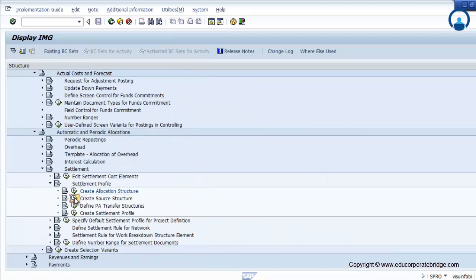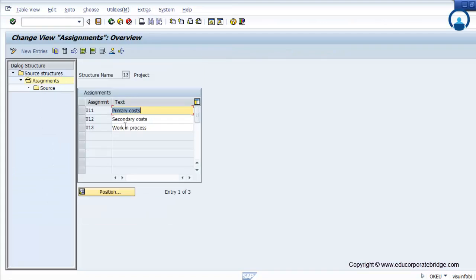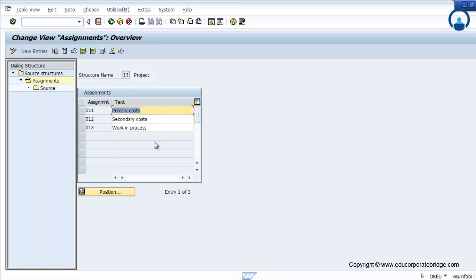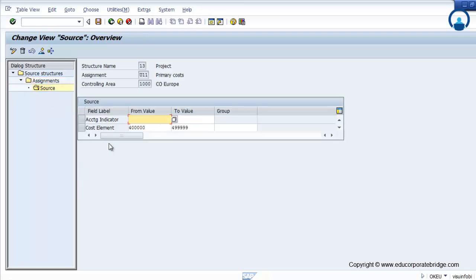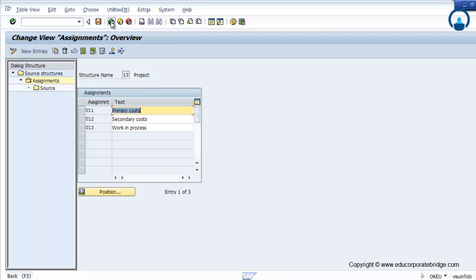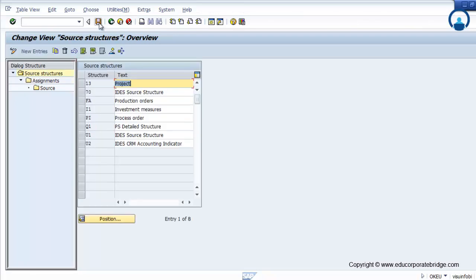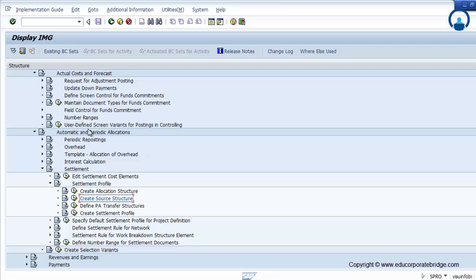Then create a source structure. Again, you have to assign the primary cost, secondary cost, work in process, and revenue cost. So you can manage different costs and you have to assign the cost element on the same. Again, this allocation structure and source structure is defined in the FICO module.